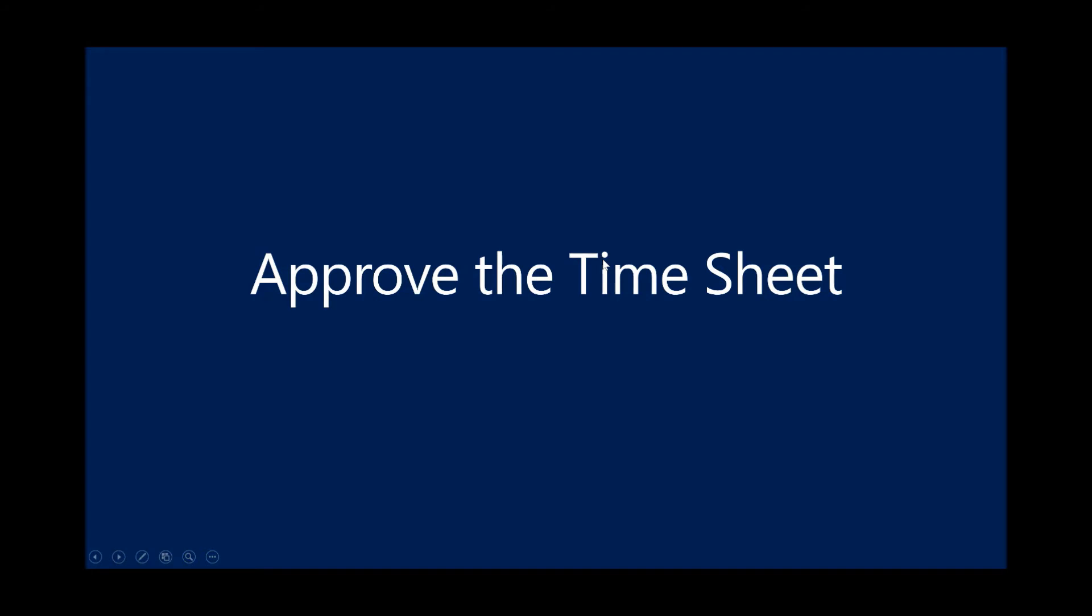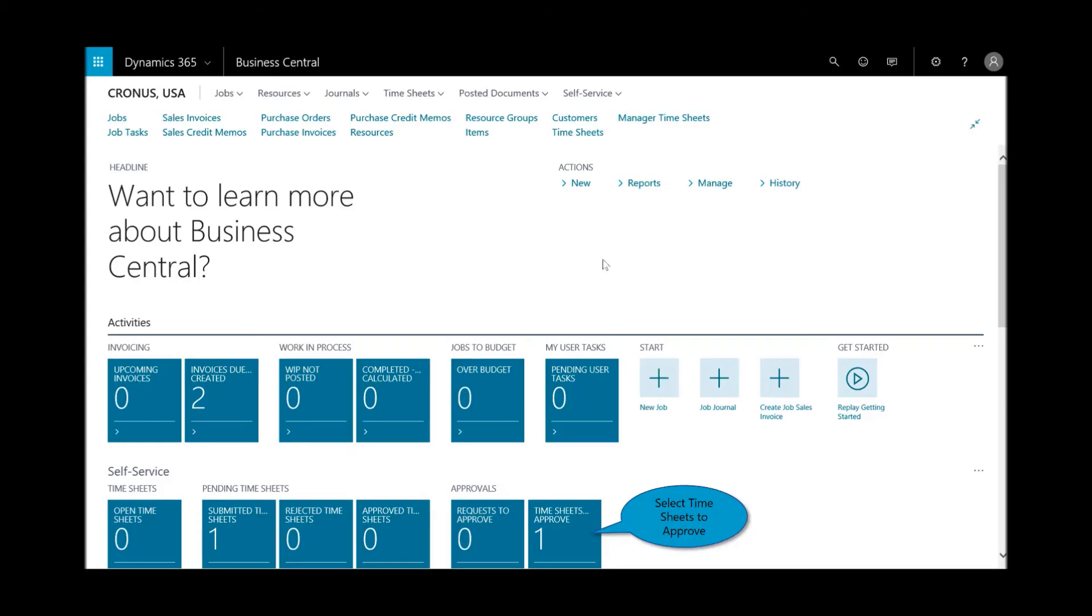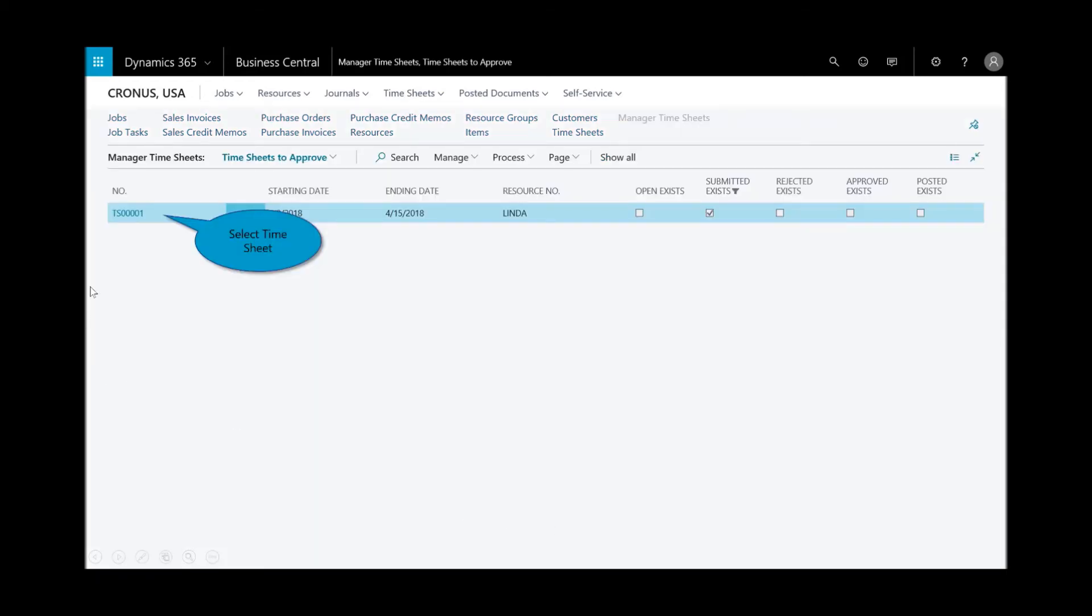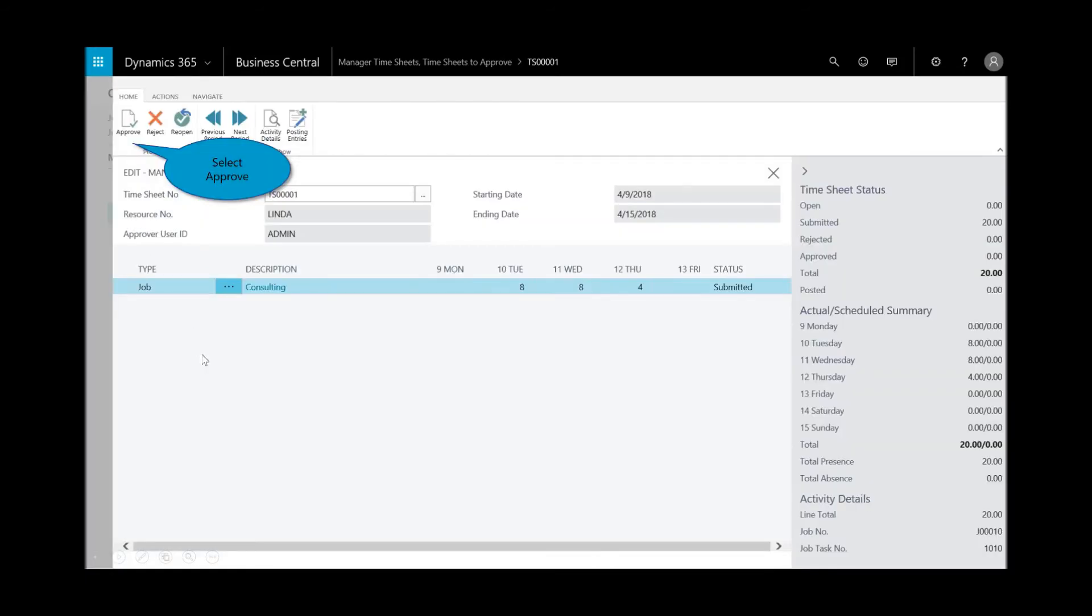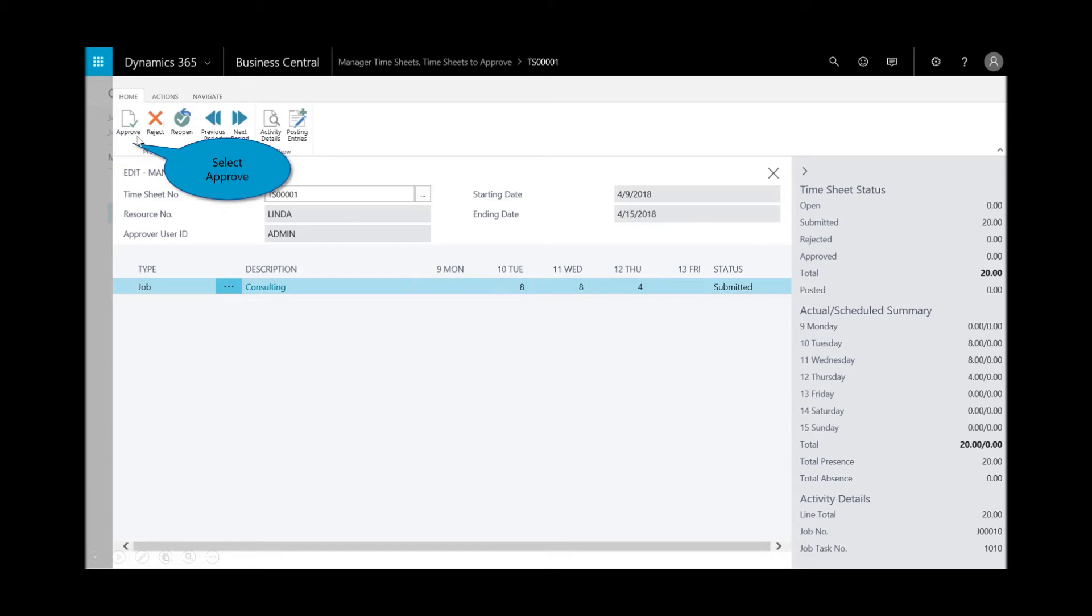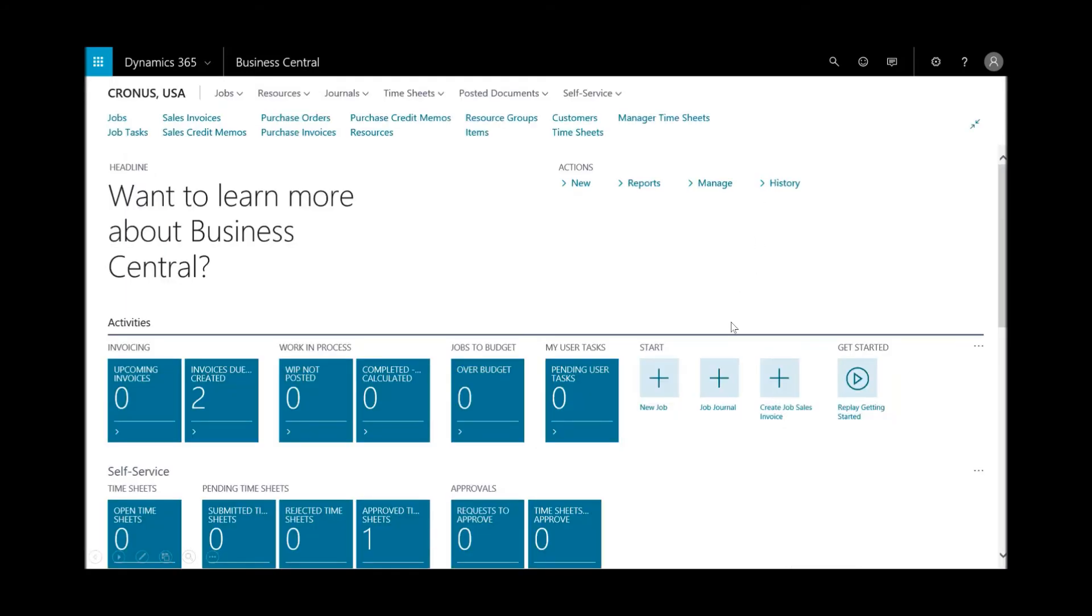Now let's assume that my on-site consultant has submitted their time, and I want to go ahead and approve the timesheet. You'll see here in the tile, I've got one timesheet to approve. I'll open that up, and you can see here I'm in the manager timesheets. I look at it, it looks good. I could look on the fact box on the right. Eight hours, eight hours and four. It's been submitted. I'll hit approve, and you'll see the status has been changed to approve. That's the steps.